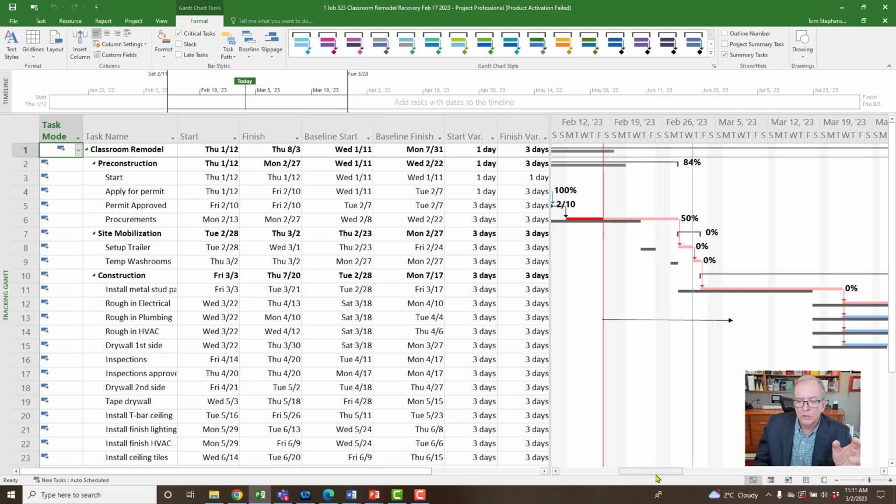And this is why it's so important to have a well-developed critical path that we talked about in the first few videos. Why it's important to have everything linked. You saw how everything moved as a result of these time impacts. If there's things that we say won't move or don't need to move, or we can do other things, now is our time to correct those things, right? And to see whether we can get this project back on track.